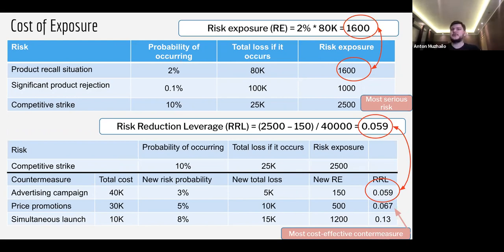For example, we have the risk in performance. We should talk to the product owners, to the marketing, and figure out how much it will cost us if end users find the performance issues. Marketing can do some surveys, some research, whatever, and can tell you that, okay, roughly 5% of all users will stop using this software because of performance issues, and will go away. For example, the expected revenue will be $1 billion. Okay, so if 5% of this revenue will be lost, this is 50K,